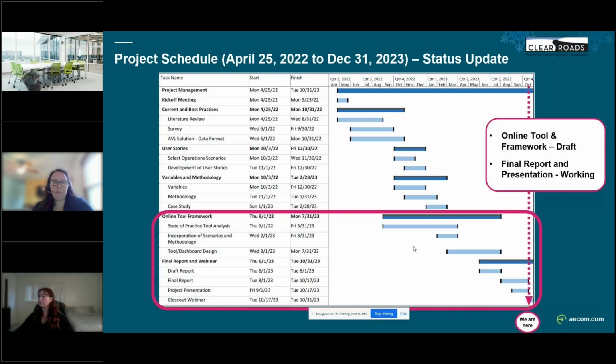Now, as you can see, we kind of originally had set it for October, but we're a little behind schedule on that. Luckily, we have plenty of time contingency schedule built into the contract. So we're shooting for December, January to wrap everything up, which still gives us plenty of buffer till the contract's over, and we are okay on budget. So little behind schedule, but we're still okay, and it's not going to affect anything or require any contract mods.